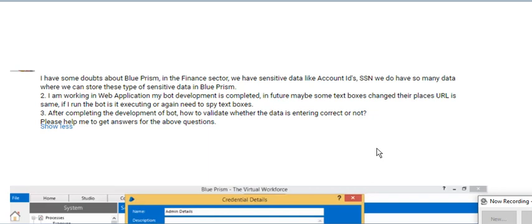But once we complete the development, they will take care, and they will have the sufficient data. User acceptance test is run by the client-side business. Once they complete it, they will go to production, and in production again they are testing. Once the client has completed the testing, it is moving into go live.